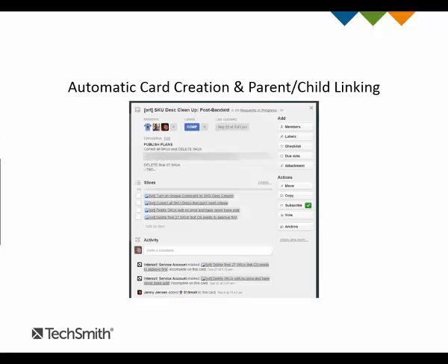One thing to note is that if there are 2 labels on this card, it will only default to the first one, and you will need to move the slices that are related to the other label's work to that appropriate board. But this script will not look for those and pull them back to the other board. It's just one and done, so don't worry about, oh my god, this has to be on the e-commerce board, and then you move it there, and then the script says no, move it back. It won't do that. So you don't have to worry about that.